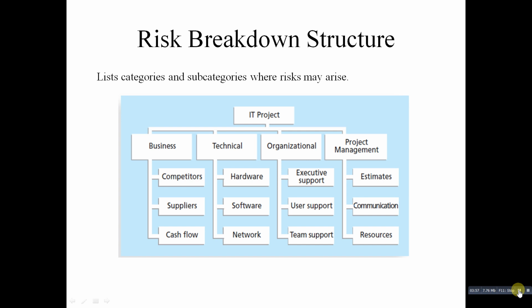As we have seen, there are 10 project management knowledge areas, and for each area there are potential negative risk conditions associated. For the integration knowledge area, risk conditions may be inadequate planning, poor resource allocation, poor integration management. Likewise, for the scope knowledge area, risk conditions may be poor definition of scope or work packages, incomplete definitions.